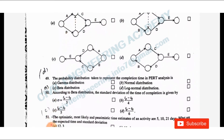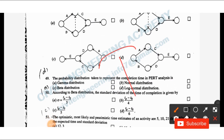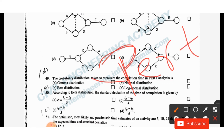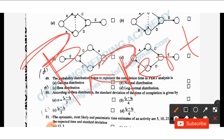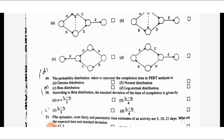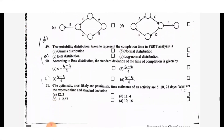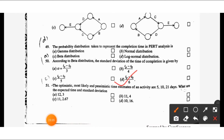Question 49: The probability distribution used to represent completion time in PERT analysis is the beta distribution — option C. Also, according to the beta distribution, the standard deviation of the time of completion is given by: sigma = (Tp minus T0) divided by 6.